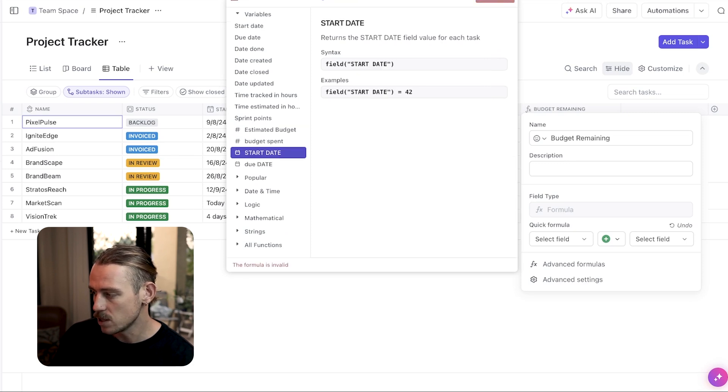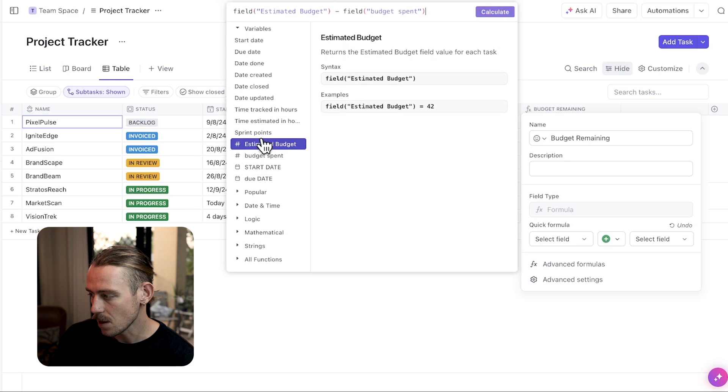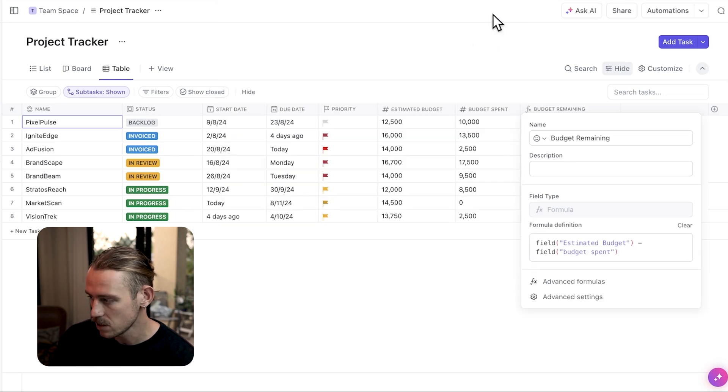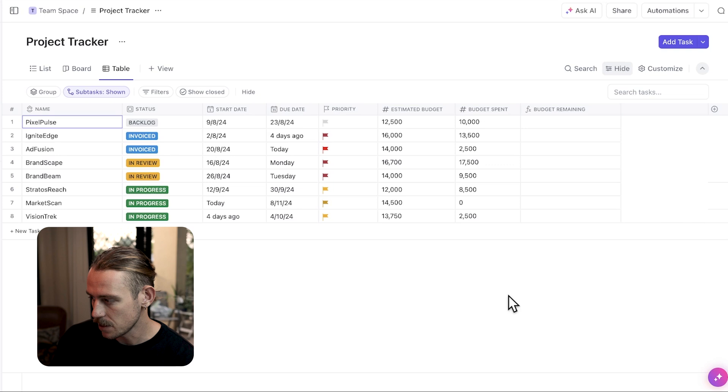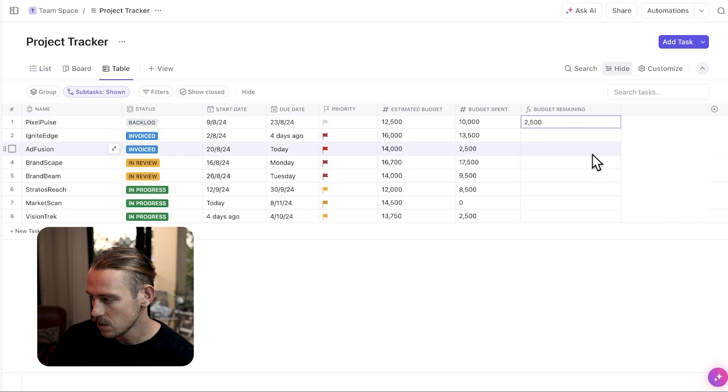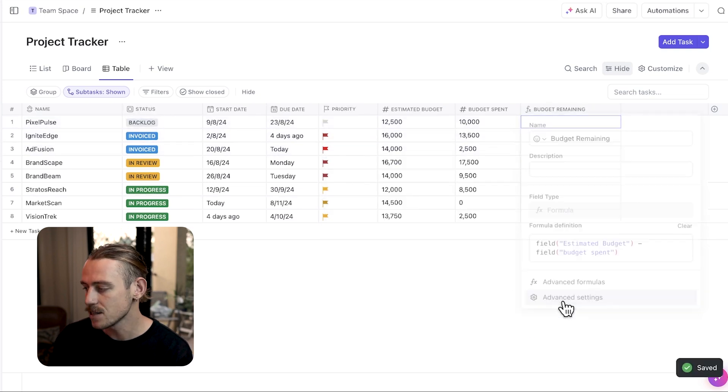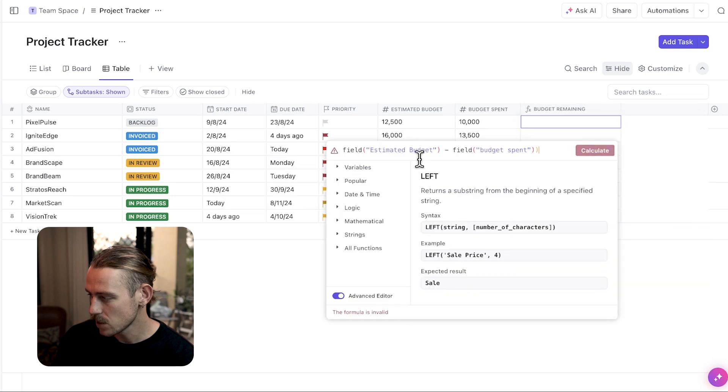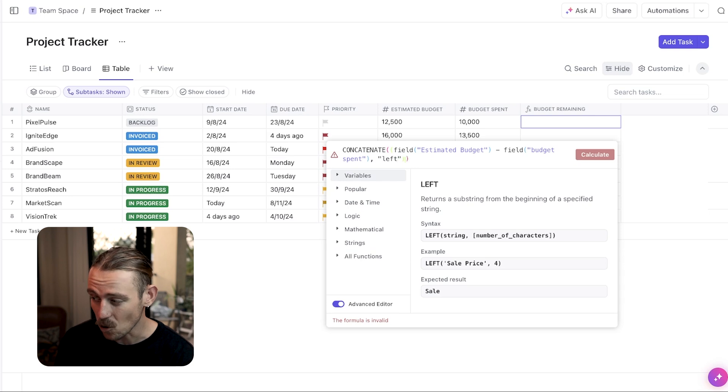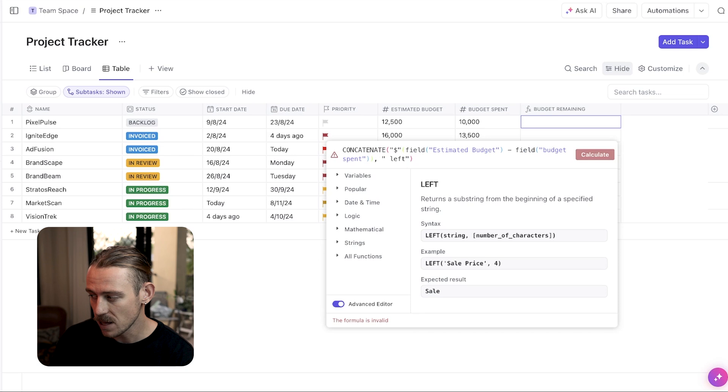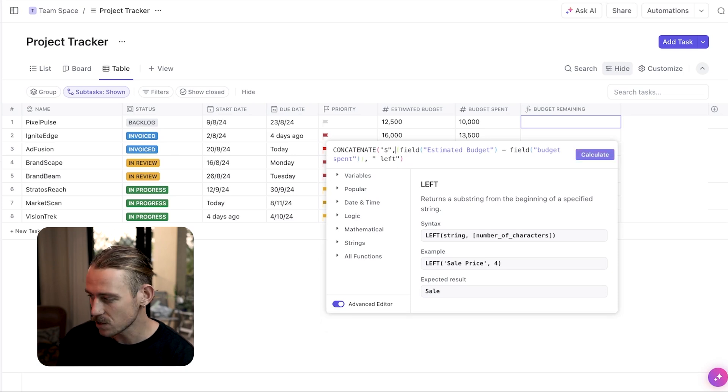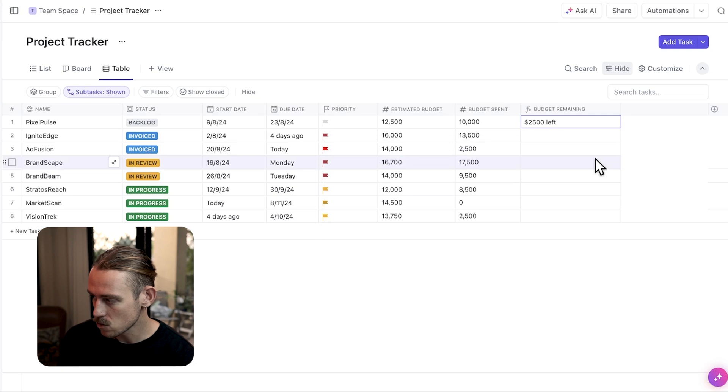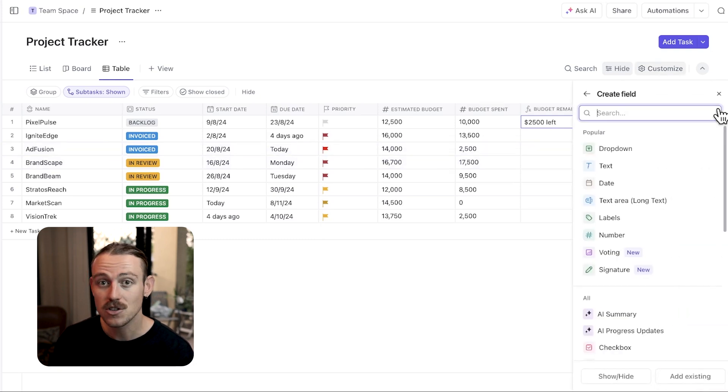I'll use the estimated budget field and subtract that from the current budget spend. Taking this further to utilize the advanced formula, let's add a label so that our team can see this is the budget we have left or the amount we have left. And let's also format this value so it includes a dollar symbol and is correctly structured.